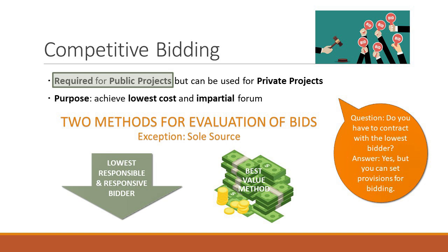If they're allowed to bid and they come in and they're lowest responsive and responsible, the answer is yes, you would have to contract with them. So what you do, and I represent a number of public agencies, and so I've had similar discussions with them. There are a couple of things you could do. Some projects you are allowed as the public agency to have, while it's lowest responsive and responsible, a bid by invite only. So it's not necessarily published where anybody can bid. But that's not all of them.